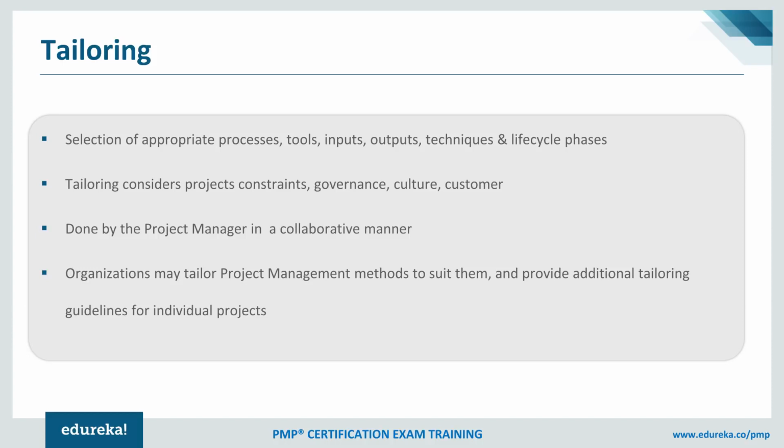What kind of governance do you need, really? I have seen sometimes the project is a high performing project, so there is a lot of attention given to it. If a project is strategically linked to the organization's objective, then that project gets a lot of attention. If that is the case, then probably you need to have a separate governance altogether. You can't really have just a governance call for the sake of it once in a fortnight or once in a month. Probably you need to have such governance calls every week. And you need to also think about how you are going to report the progress of such a project to the senior management, what kind of dashboard you should be using, etc.